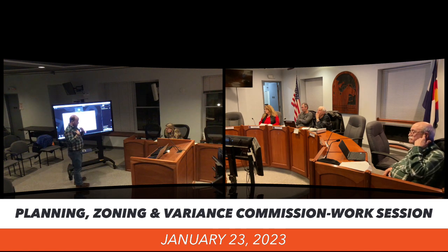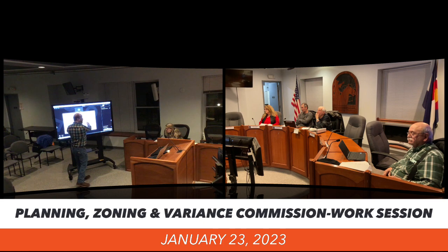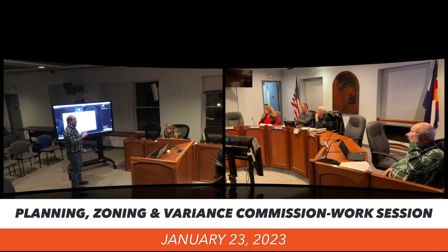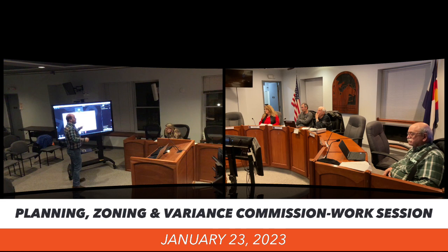For me as a developer, for my bank loan, this all has to be subdivided as one master parcel because the bank is lending my note on this parcel. The issue is that when I go to sell off each one of these, I have to prepare a separate plat for every single lot. For me to have to come back to you and ask for those approvals every time, I'm going to miss. No, that makes total sense.